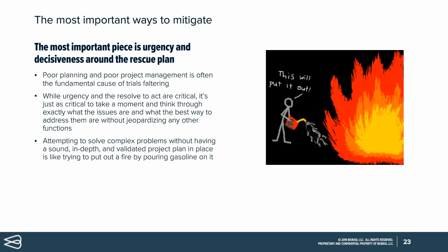And one of the things we do at Biorasi is we actually have a rescue plan, and that includes tools and templates and best practices and everything from each functional area, whether or not there are database migrations that are going to occur, whether or not there are co-monitoring visits that are going to occur, whether or not there are just teleconferences between the outgoing monitor and the ingoing monitor, and how the monitoring visit reports are going to be tailored and/or changed throughout the rescue. So those things all have to go into the plan, and then they have to be executed per the plan. Otherwise, you probably aren't going to have as much success or return on intervention as you'd hoped.